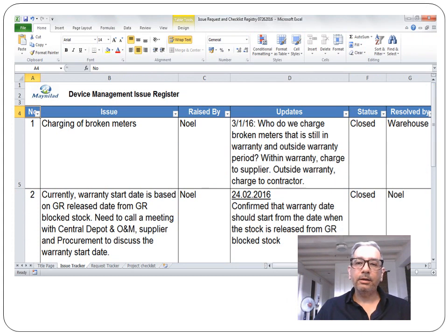If the project is having issues, then what we would do is go to the issue registry, which is a simple Excel sheet, which itemizes all the different issues that have been encountered and the status, whether it has been resolved, it's still open, and the action that has been done in order to resolve it. So with such a simple tool, we can actually manage projects pretty efficiently.